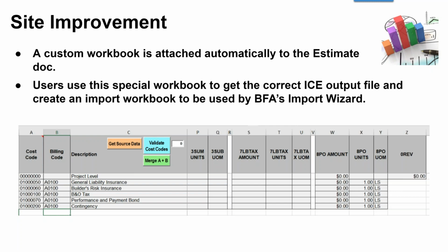The final step in the process of this workbook was the cost code validation. As I mentioned many times, the import process would stall because they either had duplicate cost codes and/or invalid cost code numbers when they would try to validate against the ERP solution. So the blue button there allows them to do that.